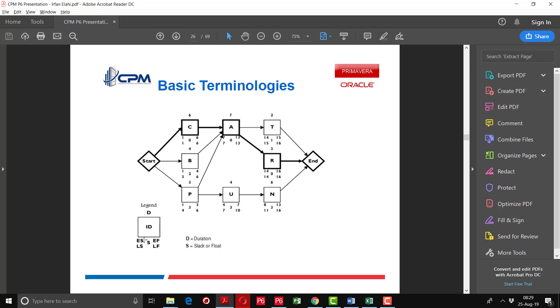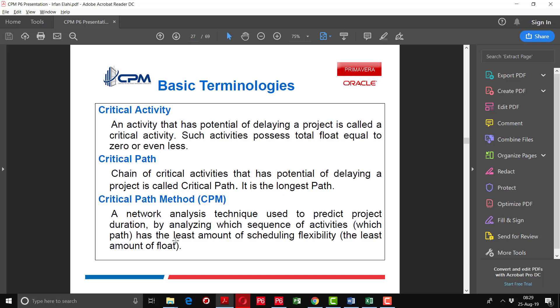The legend shows early start, early finish, late start, late finish, and float — also called slack. A critical activity is one that has the potential to delay a project; such activities have total float equal to zero. The critical path is a chain of critical activities that has the potential to delay a project — it is the longest path. The critical path method is a network analysis technique used to predict project duration by analyzing which sequence of activities has the least amount of scheduling flexibility.